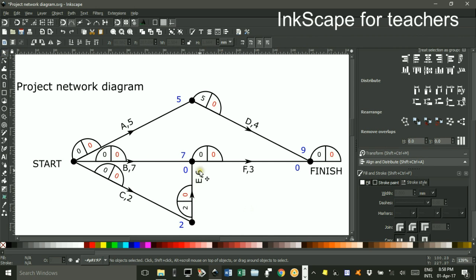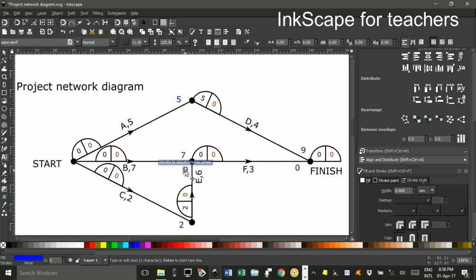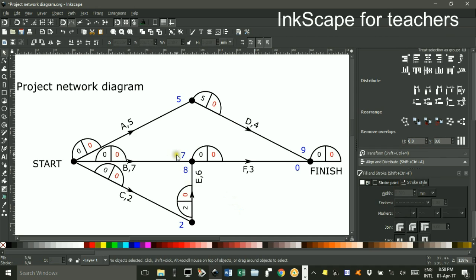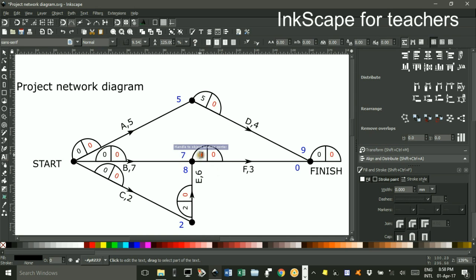Now 2 and 6 is 8, so it takes me 8 going this way to get to this node. It only took me 7 before, but there's no point in continuing unless all activities are completed, so it's the 8 that's important, and I'll put the 8 in here.